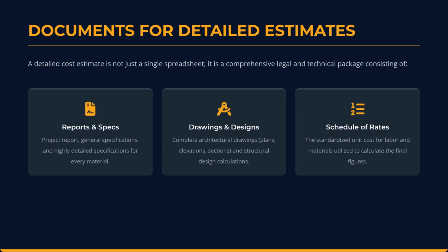A detailed estimate isn't just a number, it's a massive document package. It must include the project report, highly detailed material specifications, all architectural drawings, structural calculations, and a standardized schedule of rates used for labor and materials.